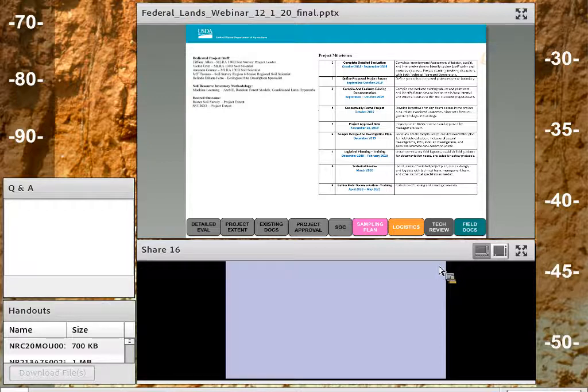It doesn't have to be set in stone, but it gives them a general idea about where we're going to be sampling, how we're going to do it, and what that investigation plan looks like, if there's going to be samples sent to the lab, so that when we're doing clearance or any kind of permitting, it makes their job a lot easier so that we can get access to the field a lot quicker.